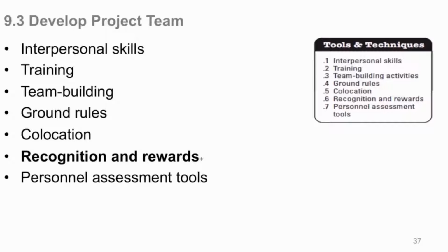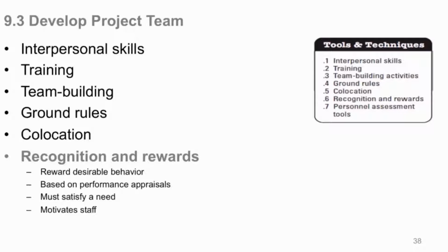And then here's recognition and rewards in developing your team. A big incentive, a big motivator for your team if you do it right. You want to reward desirable behavior, and again, you don't want to be arbitrary. You want to reward it based on preset conditions in your human resource management plan. You may have many things you can do. I'm going to pick number 3 because this guy did so and so, or this lady was effective in doing something, so she gets this kind of reward: cash reward, certificate, free dinner, whatever it is that you set. They know that it's available, whatever that might be, because they can read the plan, and they may actually strive for some of those things. It makes them a better team.